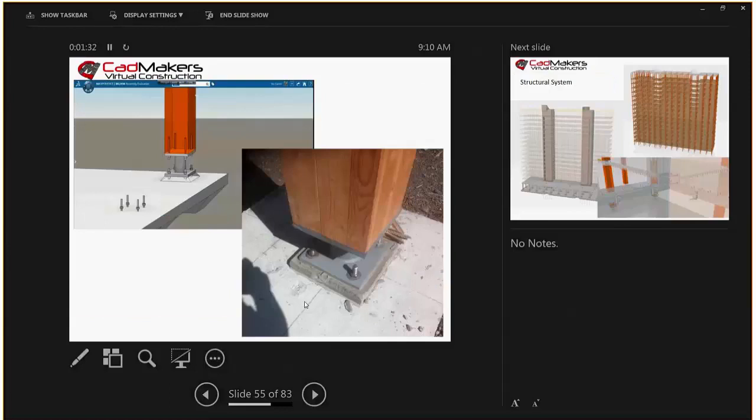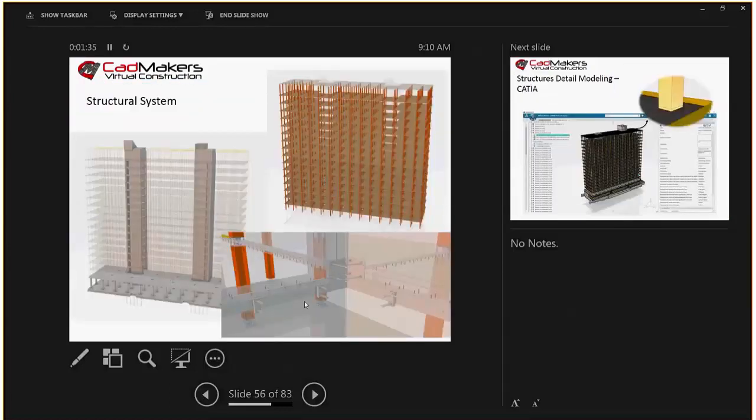Some details from virtual to live. The full building structure, like I said, is 2 concrete cores, cross-laminated timber, and steel connectors. Every screw, every nut, every bolt, every component is in the model. Not necessarily practical in every project, but in this case, these screws are engineered in Germany, and they're like $2 a screw. So it was material to the cost of the project to have these components, and it ended up being beneficial down the road from a digital fabrication perspective.